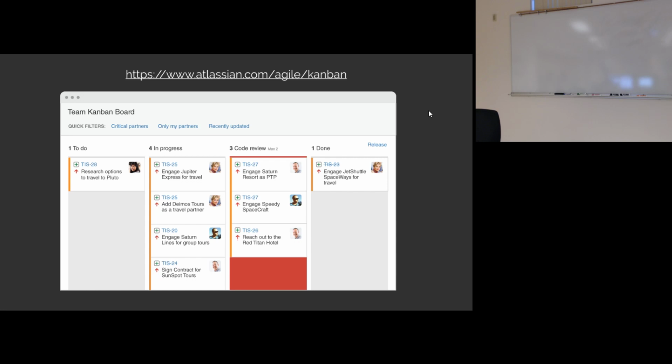So when you find out that it's getting stuck here because of something, or you need a better way of monitoring what's actually happening, you'll split that, add another column, and say, now we can track that. That makes sense? Usually comes out of what your actual process is.